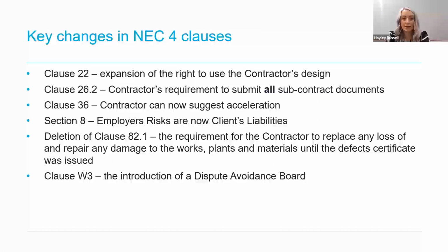As we mentioned, a new clause W3 has also introduced a dispute avoidance board, following in the footsteps of the likes of FIDIC, and likely with an eye to the international users. The dispute avoidance board is nominated at the start of the project and becomes familiar with the project as it progresses, making regular visits to the site.